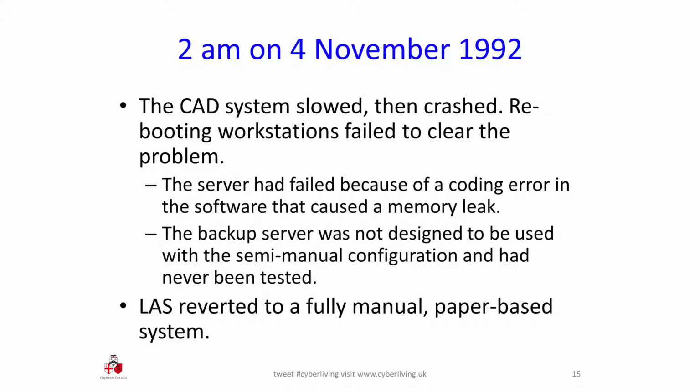And on the 4th of November, at 2 o'clock in the morning, the system crashed. It gradually slowed down over a period of about 10 minutes, and then it crashed. They tried to reboot it. The staff had been told, if this happens, reboot the workstations. They rebooted the workstations. It made no difference because the problem was a memory leak in the software of the server. And so the server had run out of memory. If they'd rebooted the server, that would probably have got them back up and running, although perhaps they would have lost some calls in the process. But the server was now down.